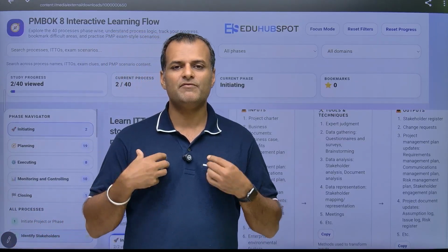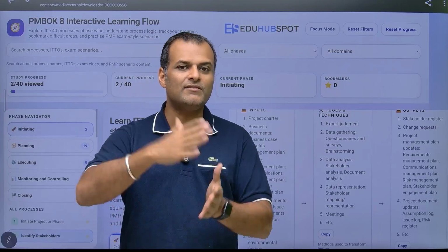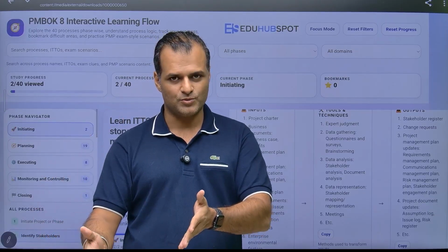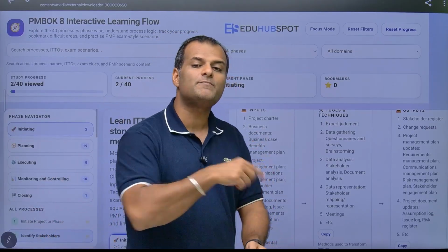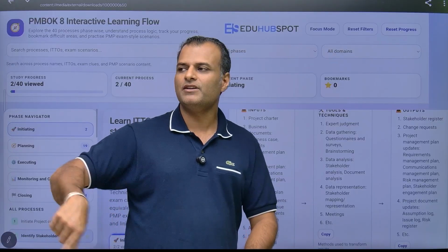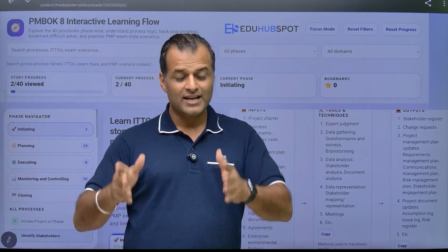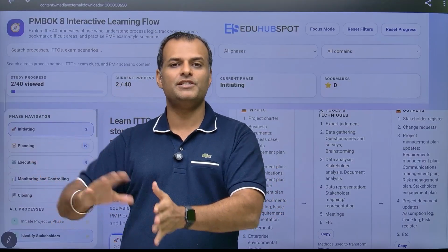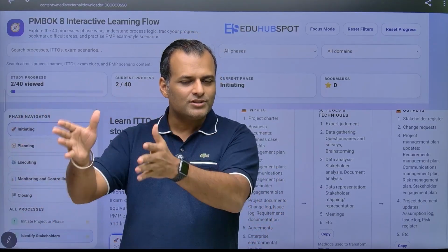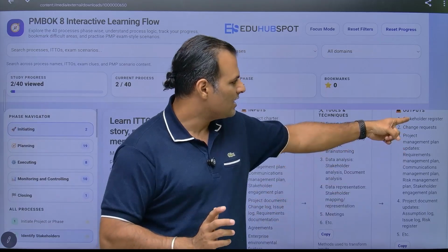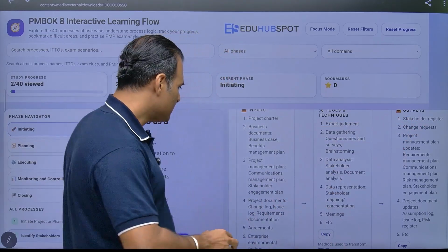For us, it's a benefit from an organization perspective, that we will have a financial benefit attached to it, right? So from a benefits management plan, I can give a responsibility to resource A, who is, let's say, the sales director, that it is his or her responsibility to sell these flats, right? So this person is a stakeholder for me. I'll update that in the stakeholder register.